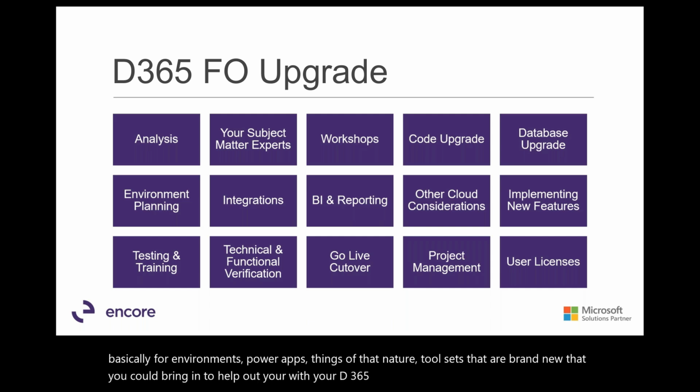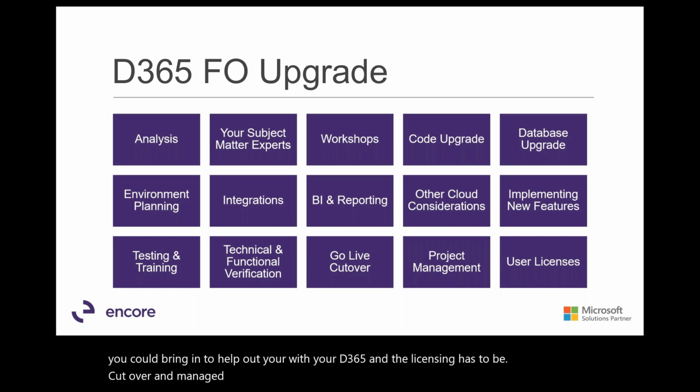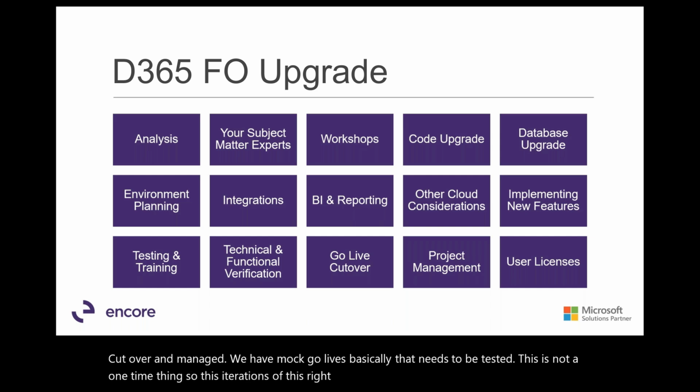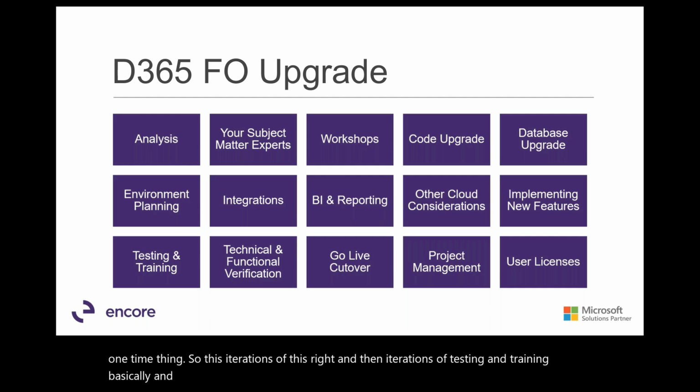And the licensing has to be cut over and managed. We have mock go lives that need to be tested. This is not a one-time thing. So there are iterations of this, and then iterations of testing and training, and then verification of the data that actually comes over.